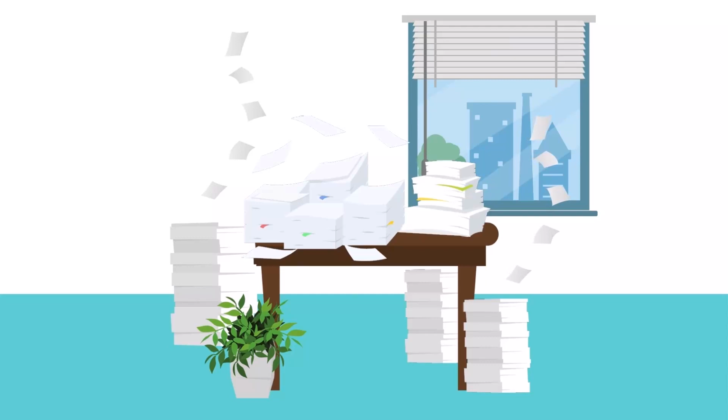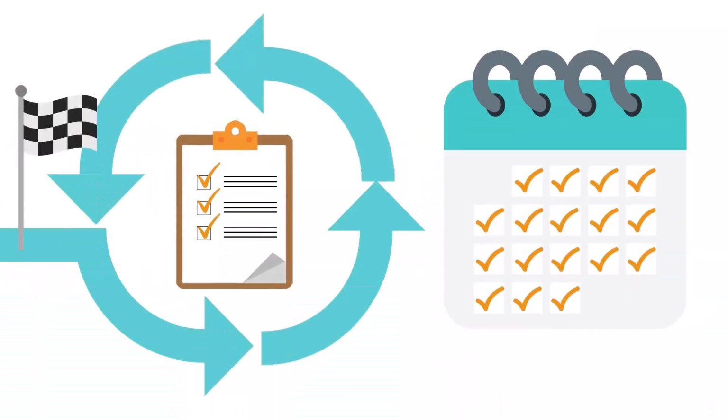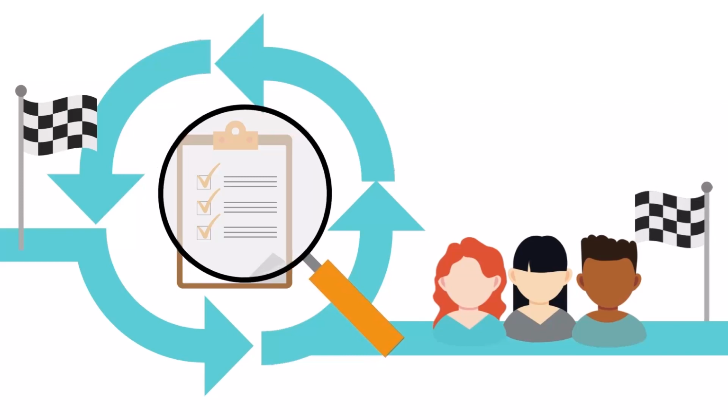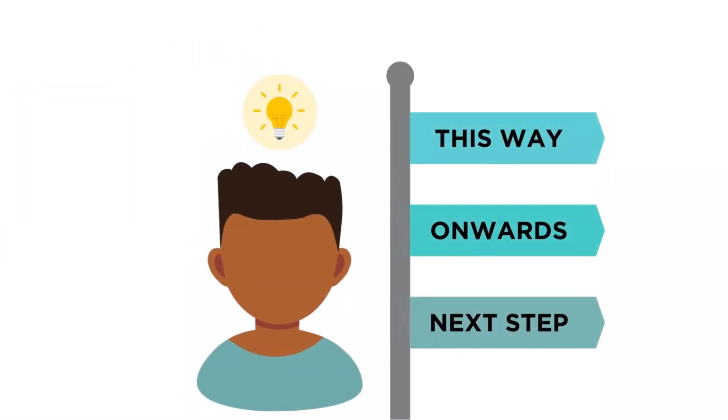So, at the start of each sprint, the team plans which high priority subset of the product backlog to create in the upcoming iteration. At the end of the iteration, the team reviews the completed features with the stakeholders to get their feedback. Based on the feedback, the product owner and team can alter both what they plan to work on next and how the team plans to do the work.